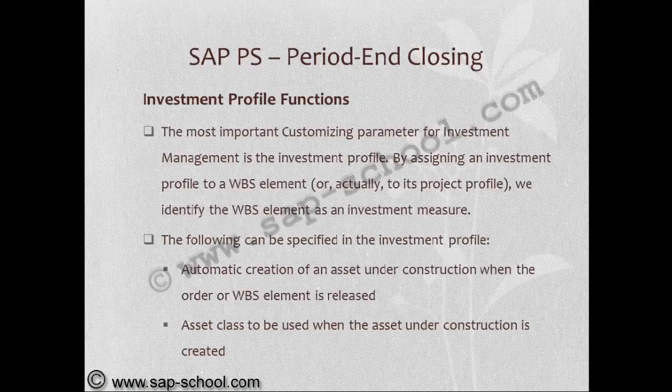Now the next thing is investment profile functions. The most important customizing parameter for investment management is the investment profile. By assigning an investment profile to a WBS element, we identify the WBS element as an investment measure. The following can be specified in the investment profile.